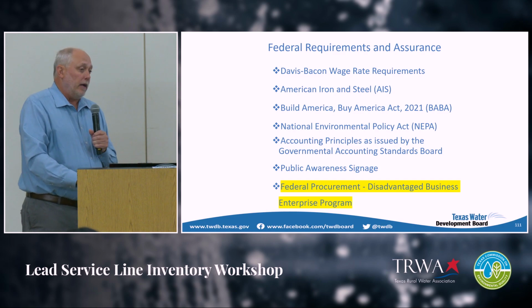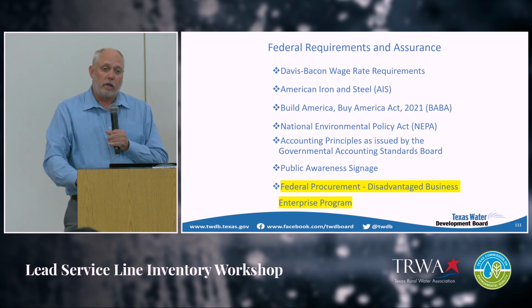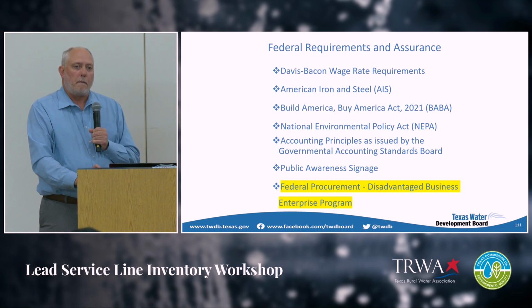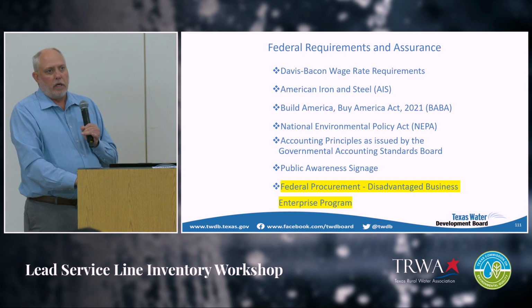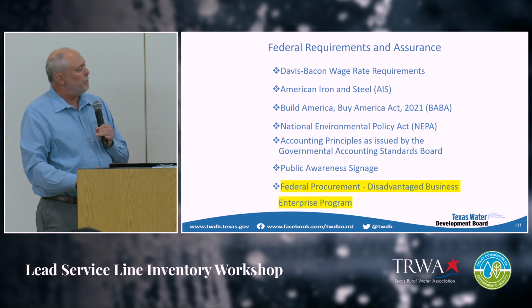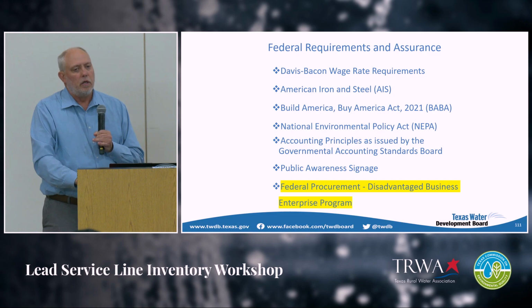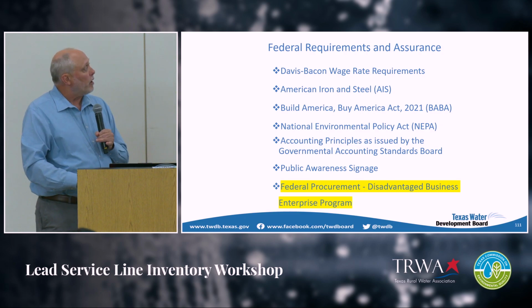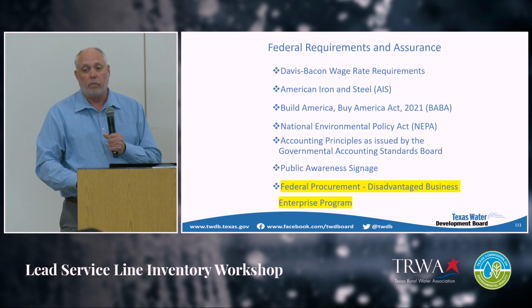There's a website available for Build America, Buy America that lists what the compliance items are. But basically, materials and vendors have to comply with products being sourced and manufactured in the U.S. So pipe, valves, fittings, on and on, have to be built or sourced in the U.S. Can't use foreign products.